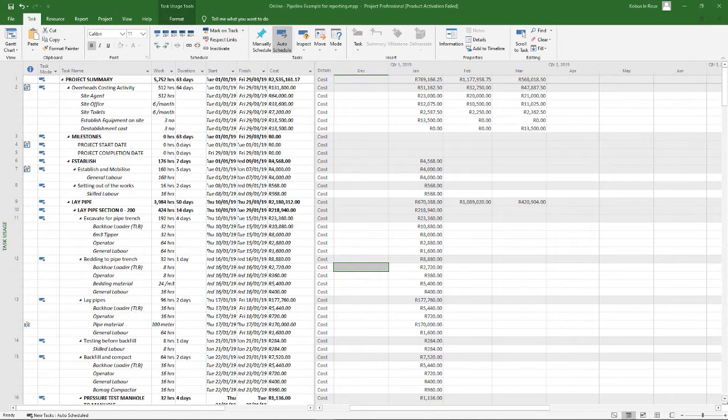So you would like to add your profit to that, which will then have a gross rate including profit, or even a selling rate that includes profit and perhaps VAT. You don't want to show them your cost or your profit, you just want to show them the tendered prices which will obviously include your profit already. Now a lot of the estimating software can do this. MS Project definitely can do it as well if you know how, and I'm going to show you in this video.